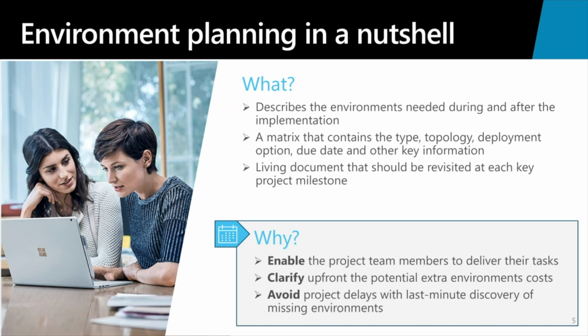It's not uncommon that, if you didn't plan for a performance testing environment or a training environment, you figure these things out right at the end of your project or right as you're needing it. And getting new environments, procuring those licenses, getting them deployed, getting all the data configured in them can oftentimes be a time-consuming process. So that's another reason why it's really important to make sure that we're taking a look at these environment plans at the beginning and then revisiting them throughout your project at the key milestones.